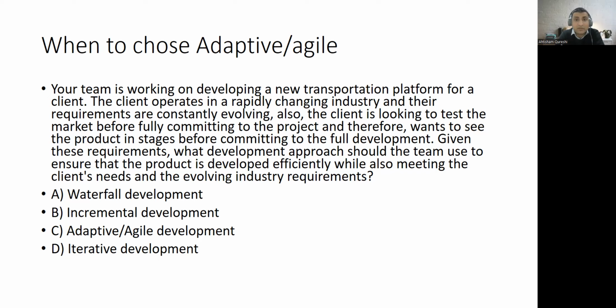Secondly, it can be incremental or iterative, or it can be both. So now let's see if it is incremental or iterative. We said that it can be iterative if the scope is not clear and there is single delivery, but it's not iterative because they want multiple deliveries. It's not single delivery. So iterative is gone, predictive is gone. So what is remaining? Two, incremental or agile.